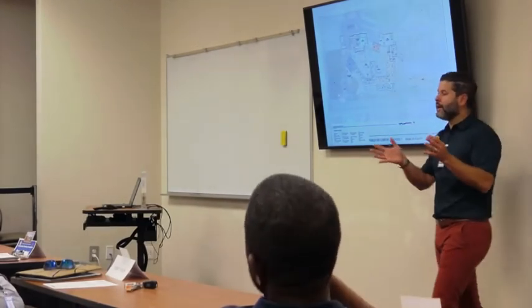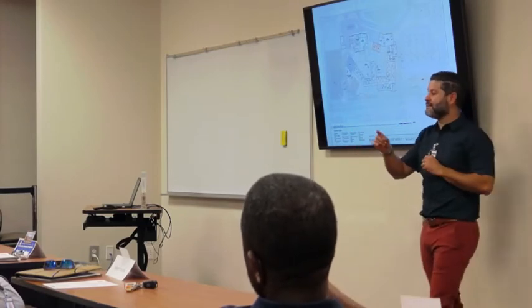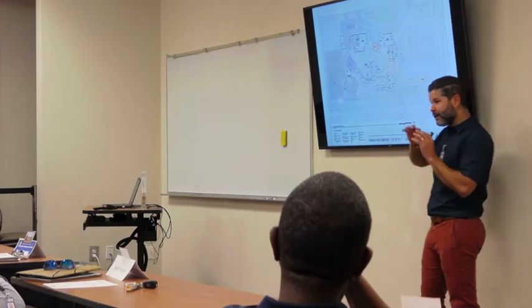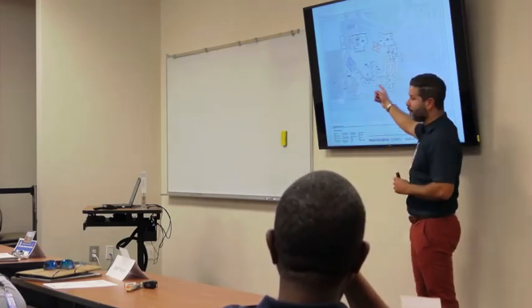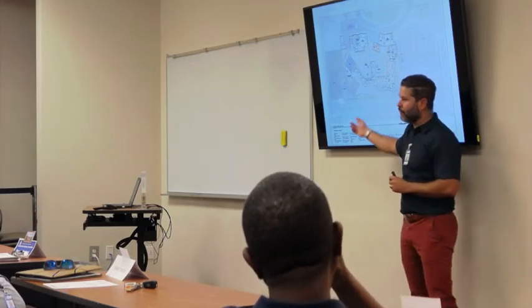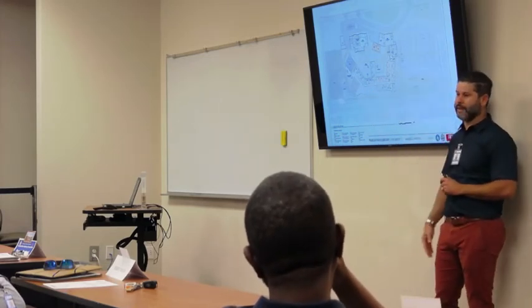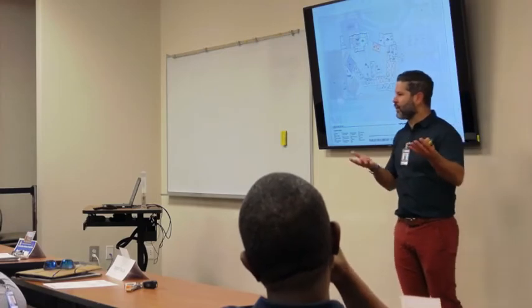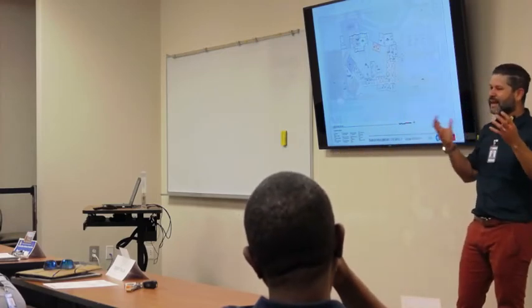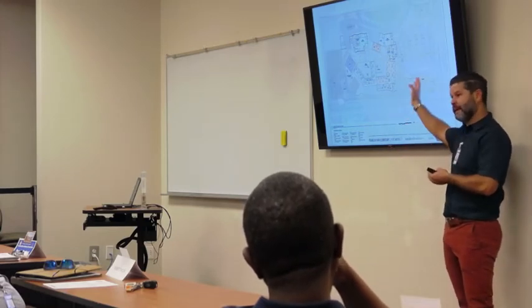No, I would not demolish a building with asbestos with children on an active site. Never, ever. But the point being is that the community, Ms. Freeman and the community, understood that they were okay creating a little bit of an inconvenience temporarily so that they can maximize and reap the benefits of full exploration of the entire site. Some things make sense, some don't, and if it's for the greater benefit, that's the route they went, so it was a pretty easy sell.